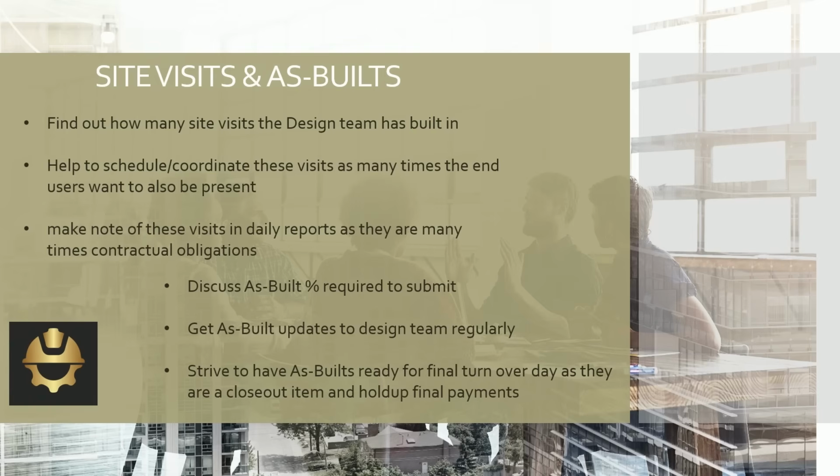So our last topic in this module is site visits and as-builts. Pretty important though, up front when you meet with your design team and have your mutual understanding, your kickoff with them, you need to find out how many site visits the design team has built into their price. Now I've been on projects where the site team says we're going to come out at 50% and then we want to come out for the final walk. If that's all they've got in it, that's all you're going to see.